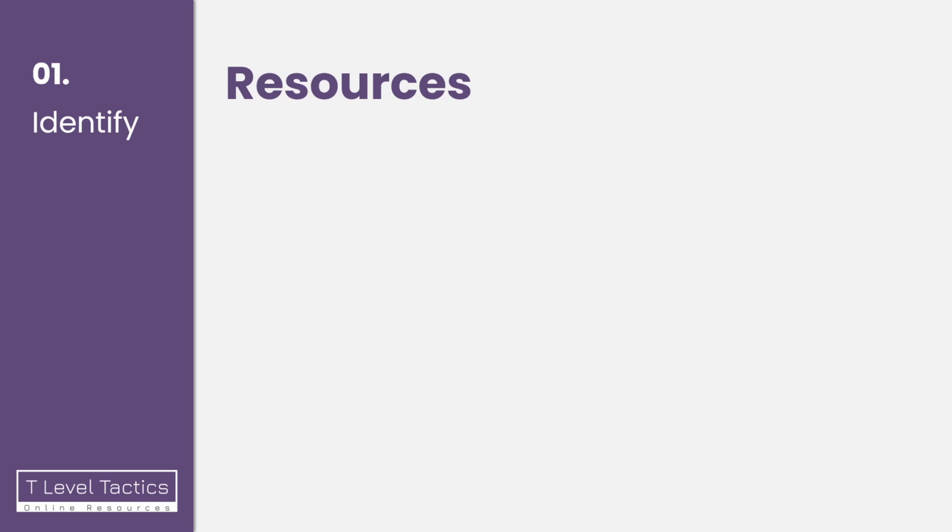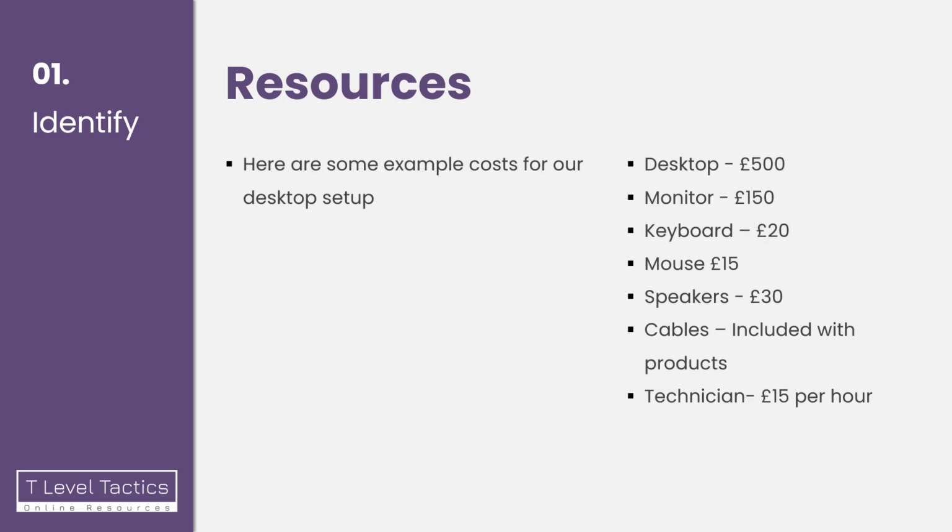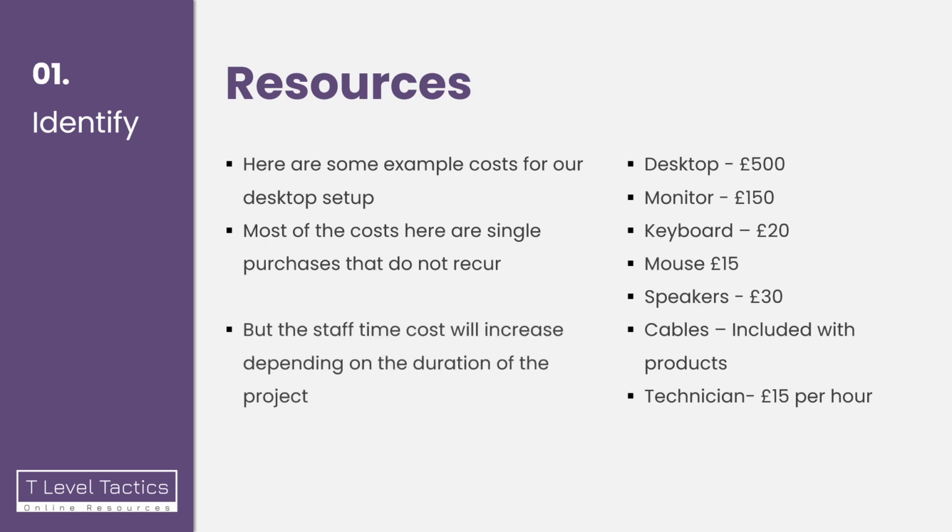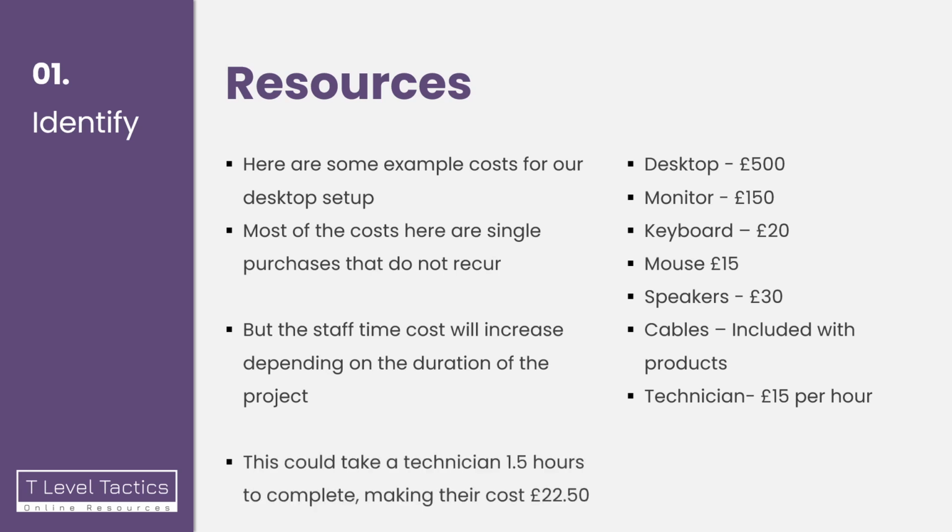Here are some example costs of our desktop setup. Most of the costs here are single purchases that don't necessarily recur. But the staff time cost will increase depending on the duration of the project or the duration of the installation. It could potentially take a technician an hour and a half to complete, making their cost £22.50 from their resource cost per hour.